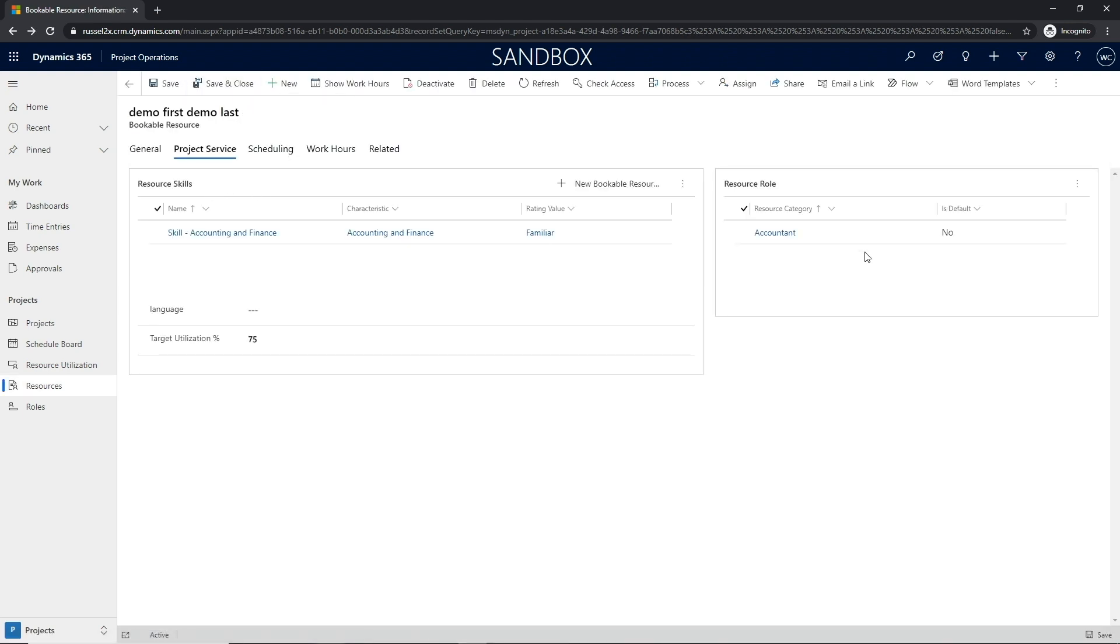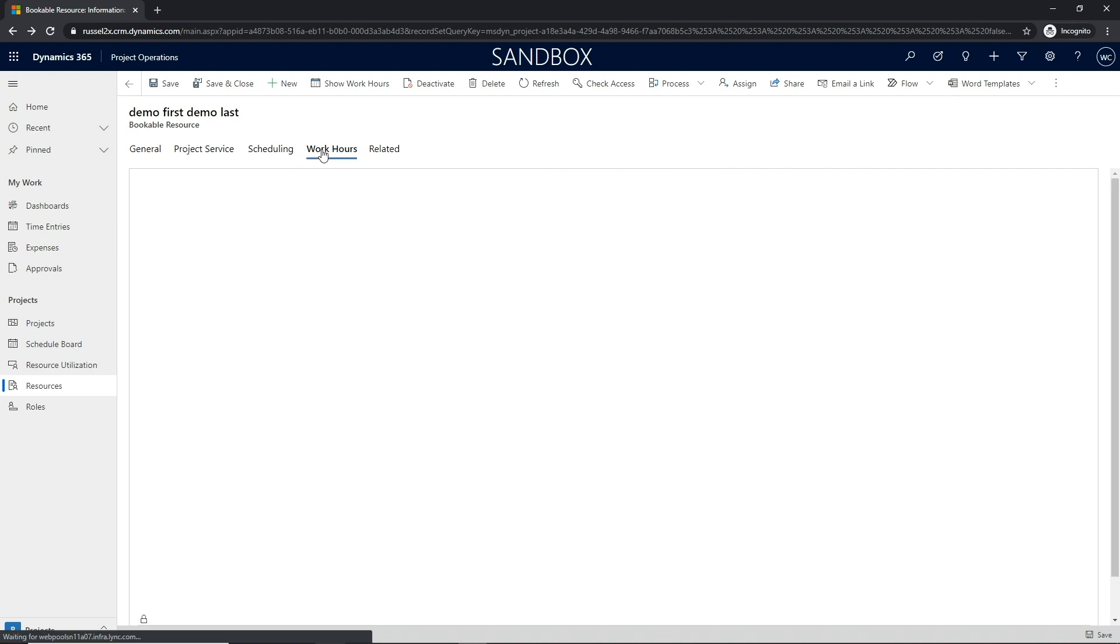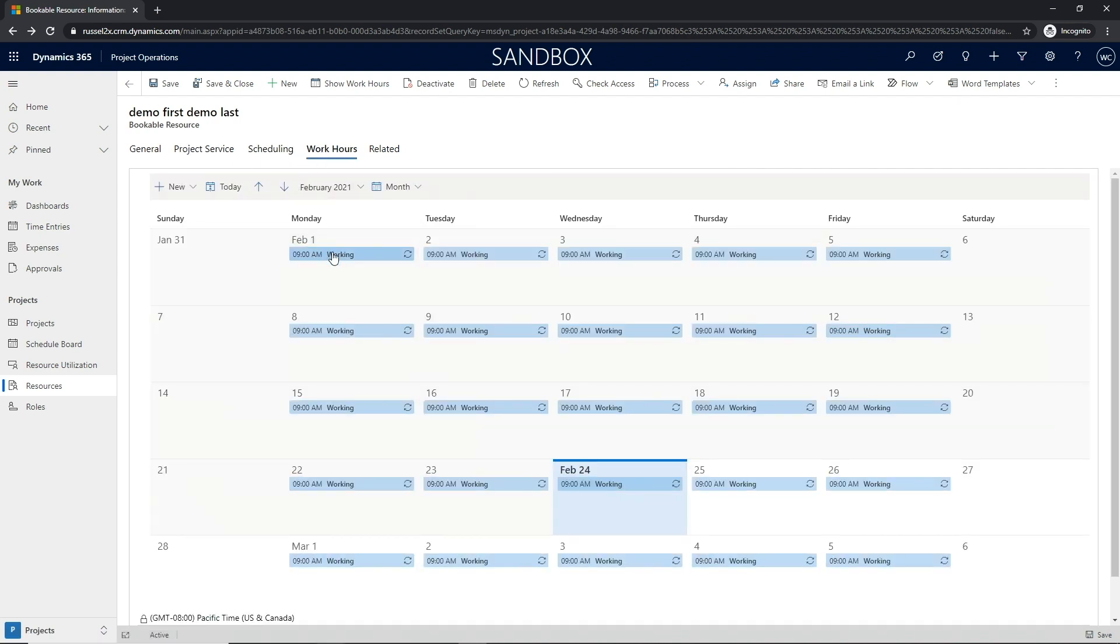Once the skills and roles have been defined, the next step is to associate and define the working hours that the resource will be available for booking.